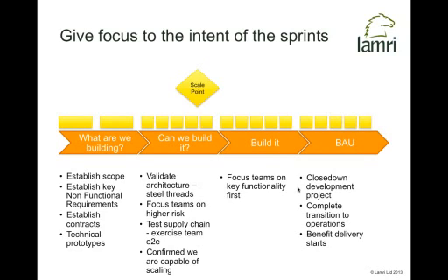We can then get into a "can we build it" type of phase. And what we're doing here is cherry-picking particular stories that will allow us to drill steel threads down through our solution stack, prove that our proposed solution architecture is up to the job, give us a framework on which we can do some scalability testing, some performance testing, and demonstrate to ourselves that we've got a solution architecture here that will deliver what our project needs to deliver. We can test our supply chain end to end, exercise the approach. We've got multiple teams working together. Actually exercise how we are all going to work together, test that approach and get it working.